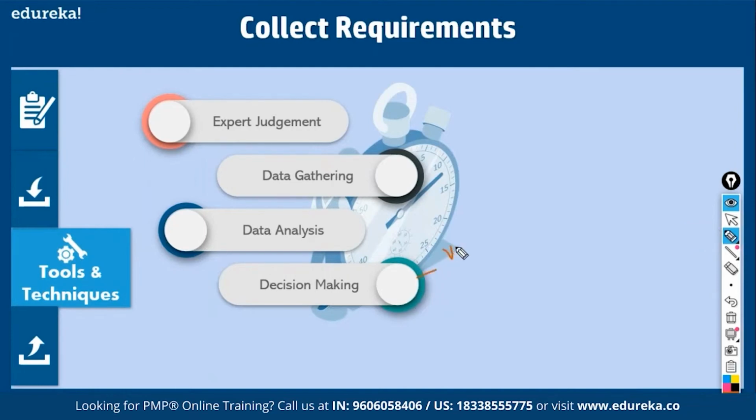Normally, decisions are taken by voting. So within voting, you have unanimity. That is 100% of stakeholders may upvote, right? Or at times you may not get unanimity, you may just get majority, more than 50% agreeing on a particular requirement. Or it could be plurality. In a plurality, it is not majority. Let's say you have a group of 10, divided like 4, 3, and 3. So 4 is not a majority, but is the largest winning block. So these are the forms of decision making.